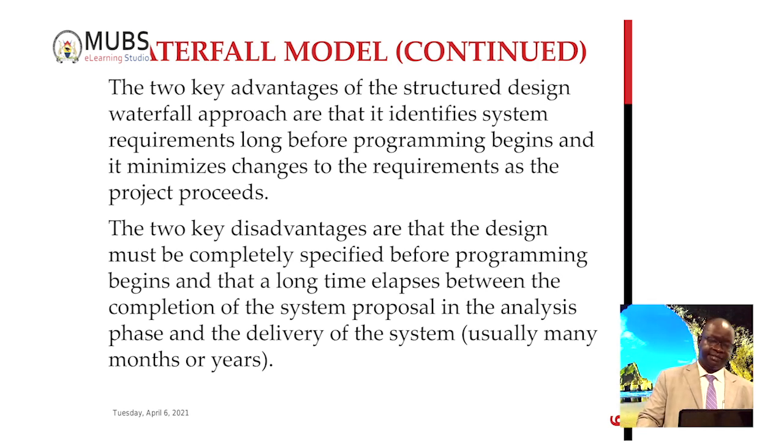So the two key advantages of the structured design waterfall approach are that it identifies system requirements long before programming begins. Now, the fact that you concentrate on planning and analysis and you commit a lot of time to do that work means you are going to come up with thorough work and the requirements may be sufficient or detailed before going to programming. And it minimizes changes to the requirements as the project proceeds. So there's no need to waste time to go back.